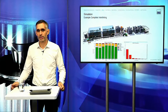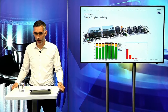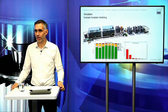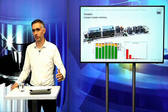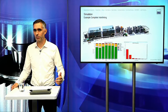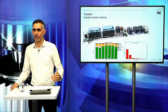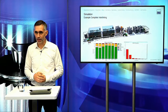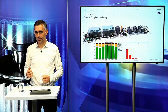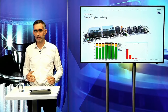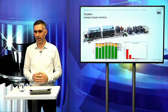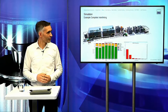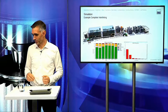During the project, we also do virtual commissioning — testing our software on a digital twin before going to the machine. The software is debugged at a higher level because we've already checked it on the digital twin. The big benefit is we can decrease commissioning time at your site and speed up the production ramp-up.